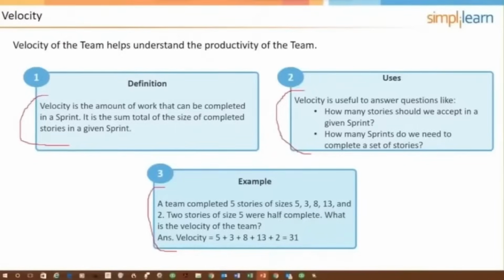But it's not going to be 36 because the only thing that counts towards progress is working software. So even if the team had finished 9 out of 10 story points for a user story, meaning it's almost done, and then the sprint ends, that doesn't get counted towards velocity. And you don't mess around with velocity. You can mess around with your estimating, and you can mess around with what user stories are going to be completed in a sprint, but you don't. The velocity is not variable. It is what it is based on past performance.